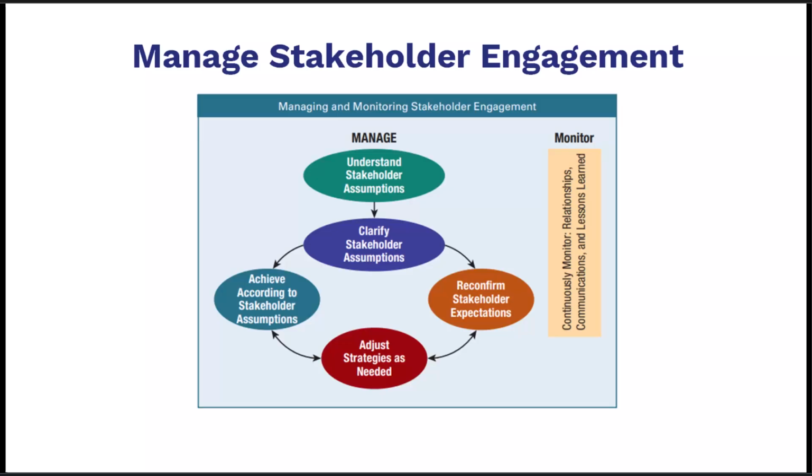Reconfirm. Obtain written acceptance from clinical leaders, patient advisory council, and compliance. Adjust strategies. Add message templates, after-hours coverage, patient education, and staff training. Achieve, go live, track turnaround time, message backlog, and satisfaction. Monitor weekly huddles and a simple dashboard. Capture lessons, for example, expand triage hours, and start the loop again.